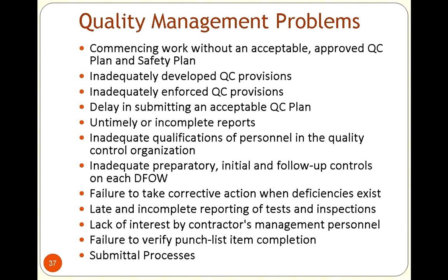And so not only do you sometimes have to define what is in the contract, but you may also have to define what will not be in the contract, because next thing you know, you've got this person who's pulling you off the job. You've got all these meetings you've got to go to because somebody didn't take the time to talk to this guy and define what would be and what would not be in the scope.